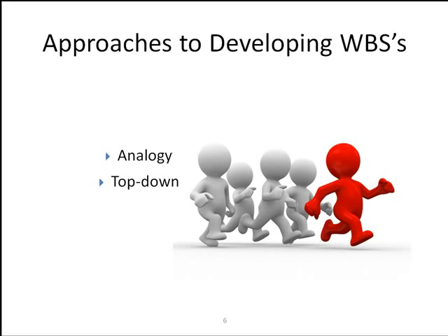The top-down approach, the one that we're going to use, here's where you start with the largest items of the project, break them down, and this is how it was used in the previous examples. You break them down into successively smaller and smaller pieces of work until you finally get to the task that you can describe in detail. Bottom-up approach, it just works in reverse. Here's where you start with the specific tasks and roll them back up into successively larger pieces of work categories.